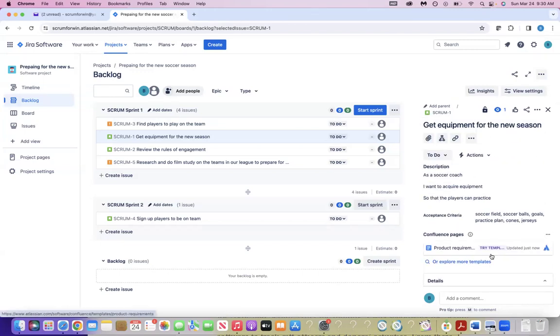All right, so another key component of estimating the way that we do is that we don't want to focus on time because people are notoriously bad at estimating time. So we estimate based on three things. We estimate based on risk and uncertainty. By us undergoing this, how much risk or uncertainty do we think there is involved? Complexity. So how complicated is this task? And effort. Those are the three things that we want to consider as we give our estimates.